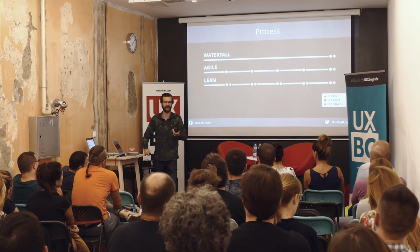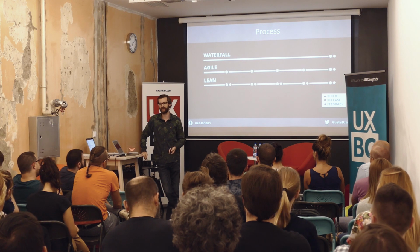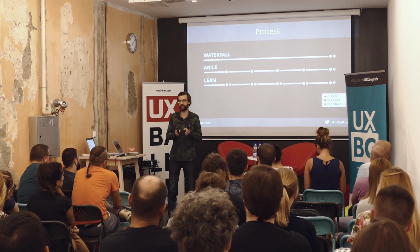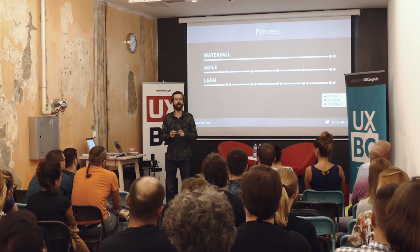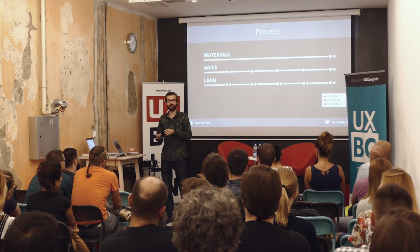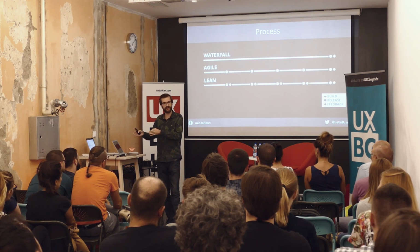We're probably getting some feedback, some emails and stuff like that, but we didn't budget any time to implement that into the design going forward. In Agile, we seek to shorten those build cycles and say, okay, we're gonna do like a 2-week sprint or something like that, build something really quick, but we only release it internally. We want to keep doing those quick little build cycles until we get to a stable build, and then we release it externally, and only then do we get feedback.